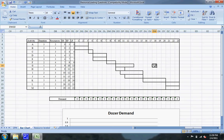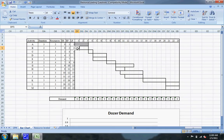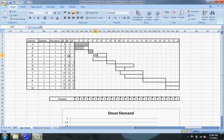Now I'll highlight the days that represent the float of the project. All critical path activities will not have any float — that's why Activity A will not have any float. Activity B will have float; the early finish is on day 2 and the late finish is on day 3, with a 2-day duration, so the first two days are highlighted and the last day is a day of float. Activity C is on the critical path, so it will not have any float. Activity D will have 2 days of float because the early finish is on the fifth and the late finish is on the seventh. Activity E will not have any float.